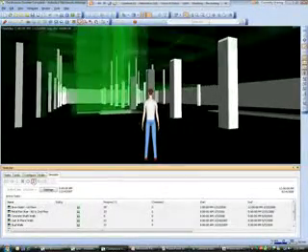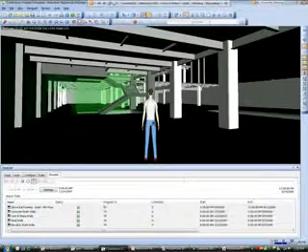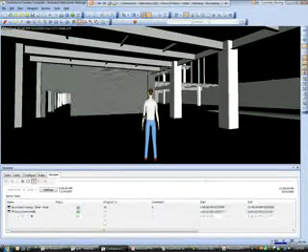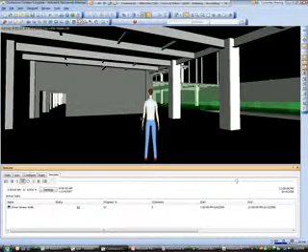And I'll go ahead and start the sequence again. So it allows me to look for errors, omissions, even logic errors in our schedule, and go back and make those changes. But it also gives us the opportunity to look for areas that we can improve on. Once again, let me just pause this here. Maybe we have too much work going on in one portion of the site. If we spread that out, we can maximize that and reduce trade stacking issues. It gives us the opportunity to identify these, go back and make those changes in the planning process, that is.